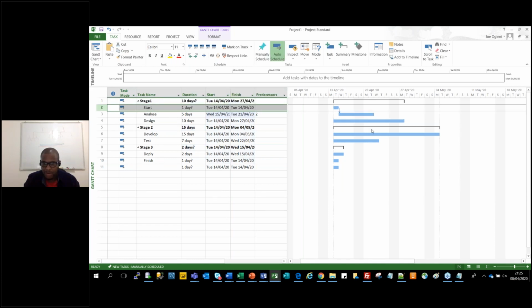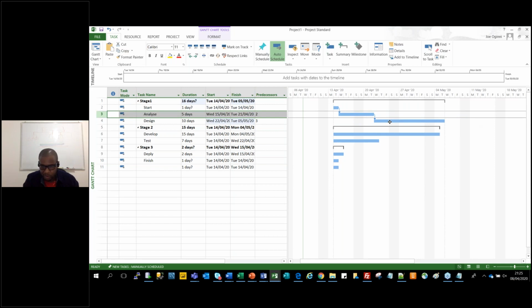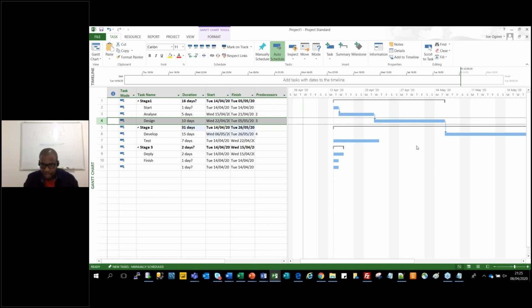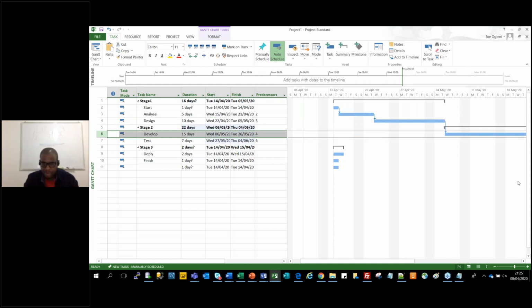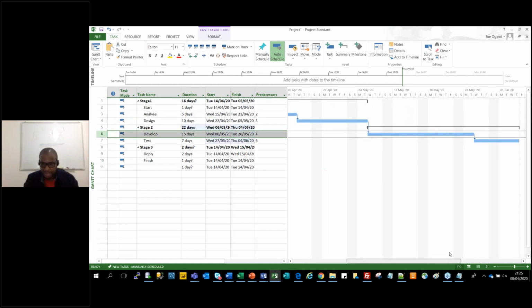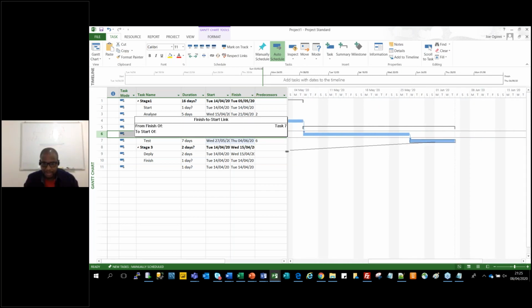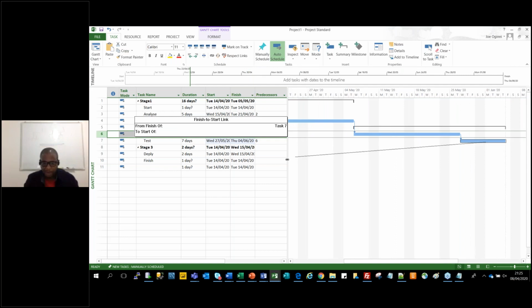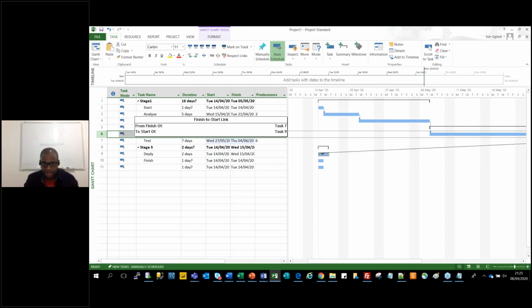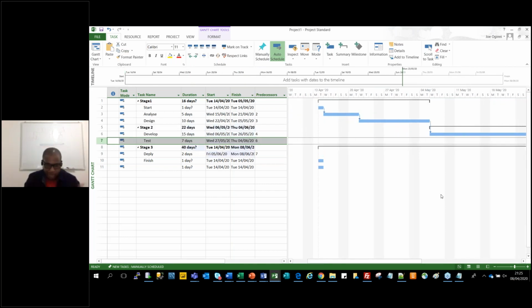But don't make the mistake of moving it left or right. When I move it left or right, you're adjusting the date unknowingly. The date changes because that's aligned to the dates on the left and right. So make sure you're just dragging it down on top of it. Don't move it, and you look for the next, and you do the same. Hopefully you can find it. Don't drop it. I'm dragging and holding. I'm not leaving it until it drops on top of that. And like that, and so on and so forth.